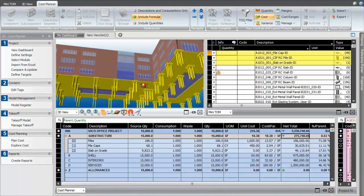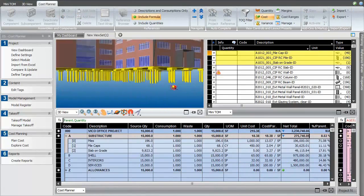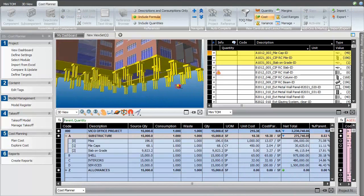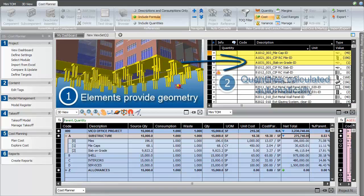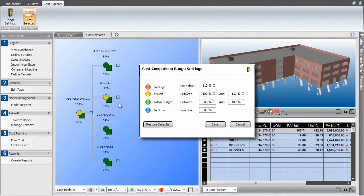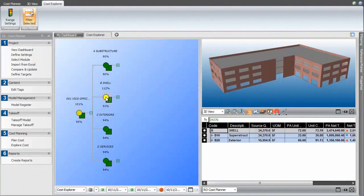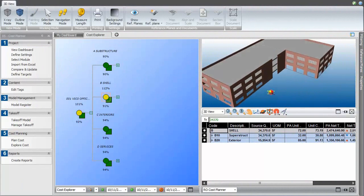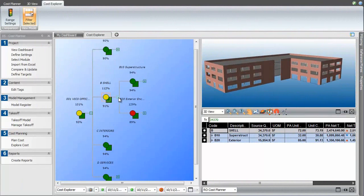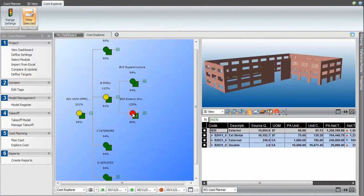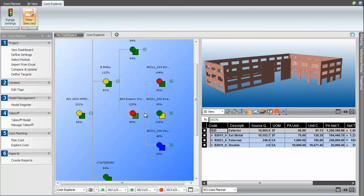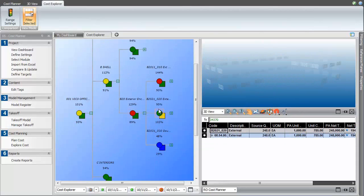We can now reference these quantities from our consolidated takeoff to complement the cost plan where necessary. The element to quantity to cost integration means that a manual change to the takeoff or an updated model will inform the cost plan automatically. As the cost plan develops and versions are marked, the stoplight colored cost explorer tree helps us understand and explain the change. It warns of over budget in red and suspiciously low numbers in blue, and all of the views are filtered just by selecting a node.